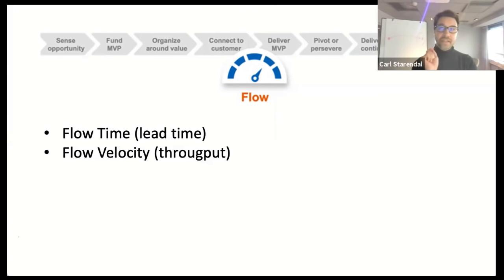And here, the key thing is that you will always have this data, because you know how many features were completed last PI. Otherwise, literally, your system doesn't work at all. So is it 5? 5, cool. How many was it previous PI? 4. Cool. So we know that sort of 4 or 5 is a reasonable amount that we could complete. If you're now asked to deliver 9, next PI, you might say that's an unreasonable request, because our current historical throughput leans towards sort of 4 or 5. And now you're saying, but Carl, size matters.